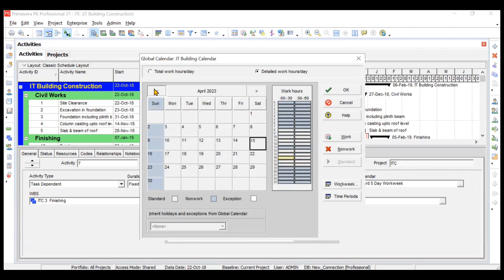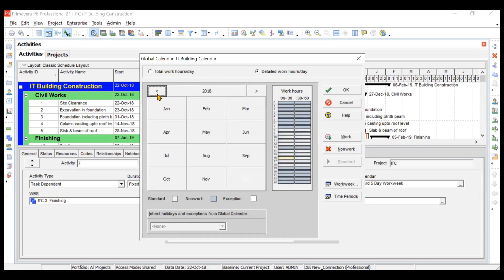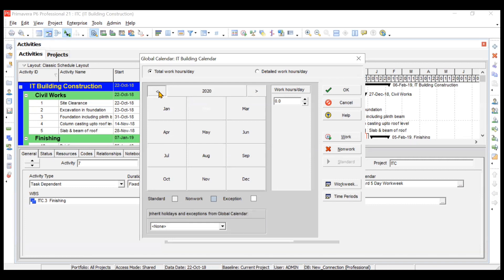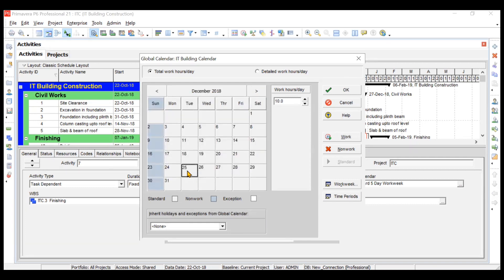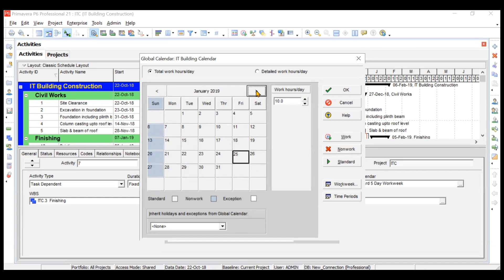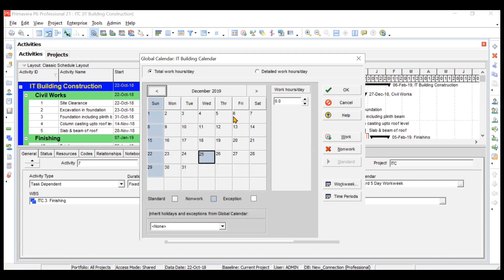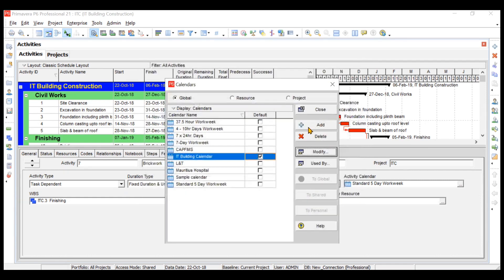Now set exceptions: 1st January and 25th December should be off. Navigate to December and mark 25th December as non-work — zero work hours. Similarly, go to 1st January and mark it as non-work. Do the same for December 2019. Click OK. The IT Building Calendar has been successfully created and is ready to be assigned to activities.